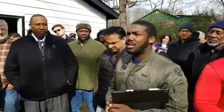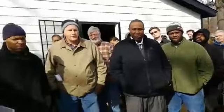You said you have an architecture guide for new investors. Do we need to go out and find one like that, or can we buy pre-made plans? Well, if you're doing a new build, you could find plans anywhere on site and purchase them. As far as my architect, every time I do a rehab, he sketches out what the original plan is, and then you have to submit a proposed plan, and a proposed plan has to be approved by the city before you can start.